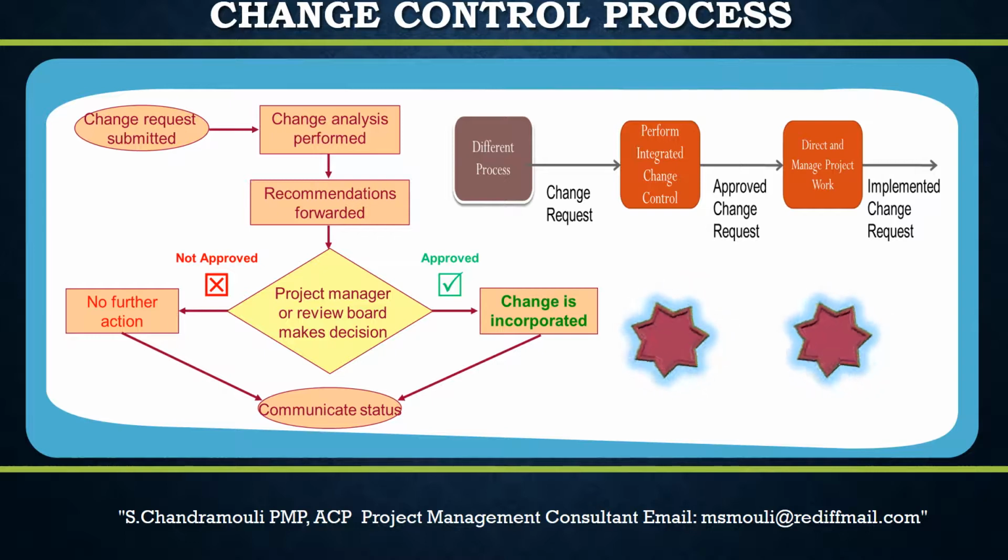6. Reviewing and approving all recommended corrective and preventive actions. 7. Controlling and updating the scope, cost, budget, schedule, and quality requirements based upon approved changes. 8. Documenting the complete impact of requested changes. 9. Validating defect repair. 10. Controlling project quality to standards based on quality reports.